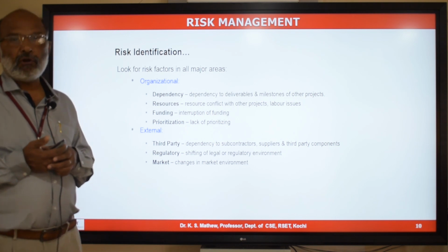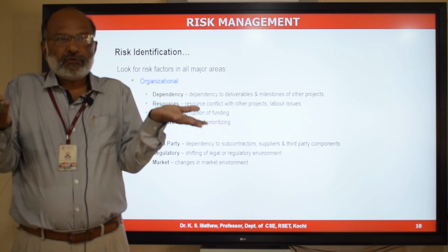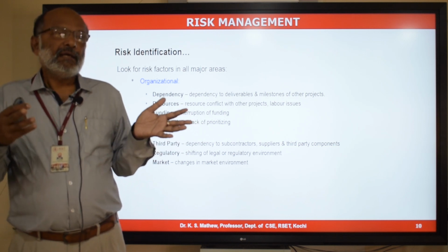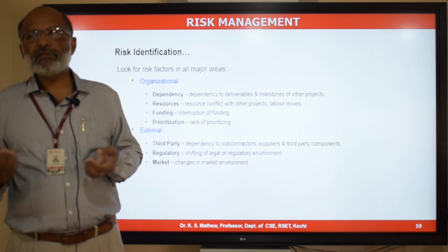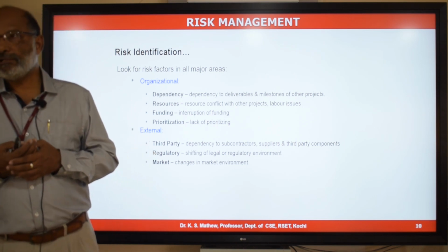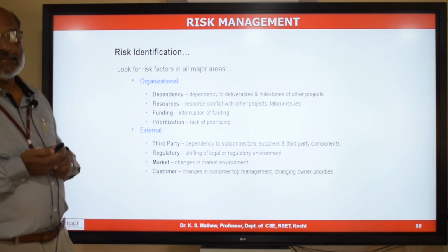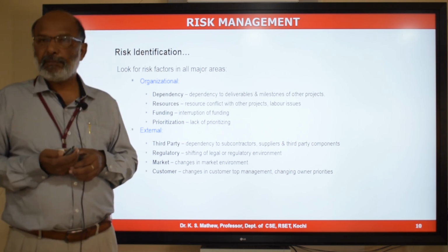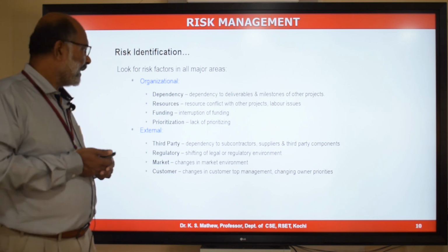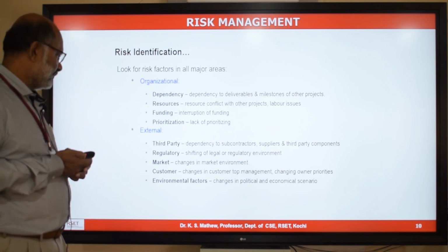And changes in the market environment may also lead to a risk. You initiated this project by seeing an opportunity in the market for your product, but when you are in the middle of the project, you find that the demand for that product in the market has come down because of another solution for the same problem. So that will have an impact on your project objective, project output. That will lead to a risk in your project. And changes in the customer top management can result in a change in the priority of the project, and it may lead to lack of funding, interruption of funding, reduction of funding, etc. And you may have risk in your project because of changes in the top management of the customer.